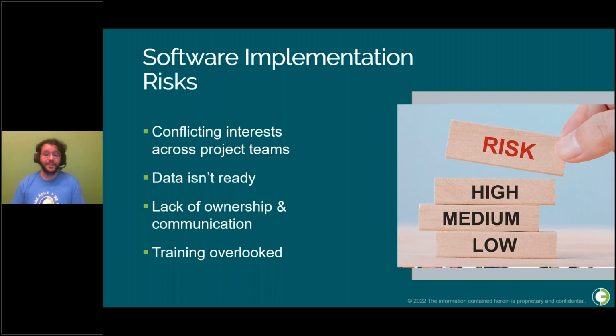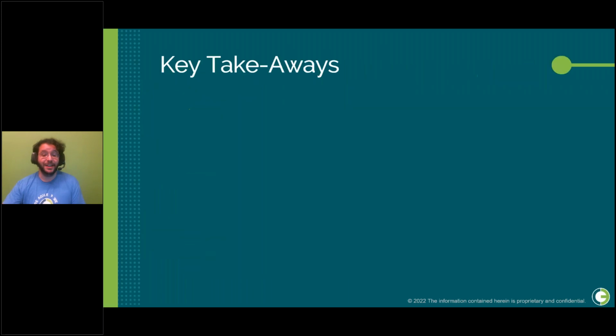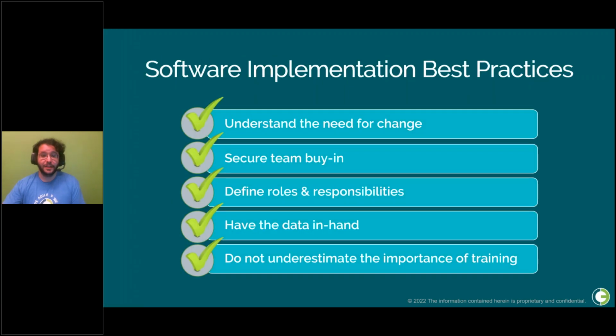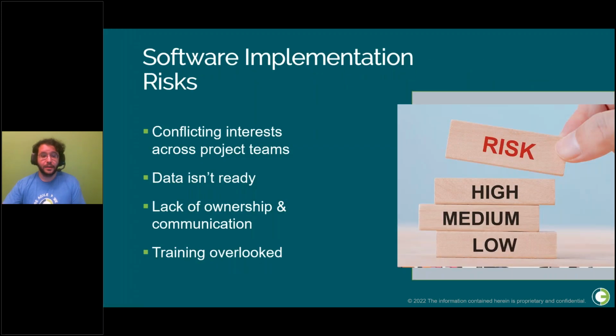And we've alluded to this many times. Not having your data ready can stall an implementation, causing it to go over schedule. You don't want to find out mid-implementation that there's missing data that you have to chase down.